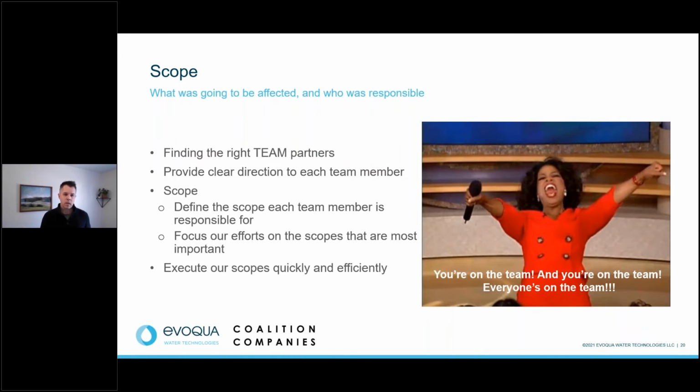And we have winter conditions because at this point we're going to miss our complete summer portion. We're going to have to be digging through the frost, which adds cost to it. There's extra management time. Pretty much we're going to assume a cost that's going to make this project dead on arrival. So as we go through that funding process, by aligning the right team, having players like Evoqua who came